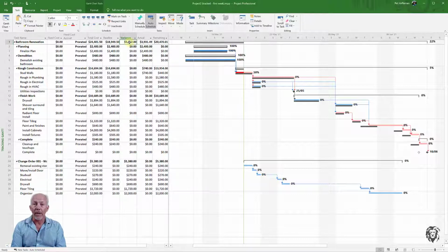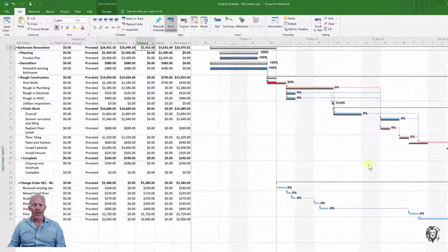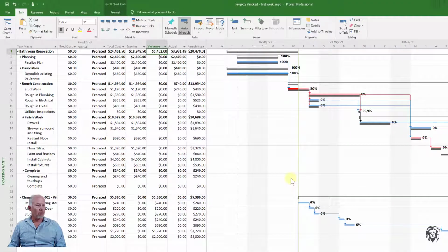And so now when I go back to my client, I can say, yeah, this is costing us $5,500 and a day delay to the project. And then I can figure out exactly what we want to bill the client for it, and he can give me the go-ahead. And if he gives me the go-ahead, I'm going to have to be fast off the mark because I've actually planned it for work starting today. And so that's pretty good.